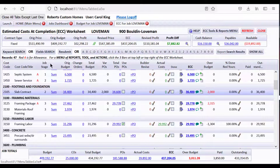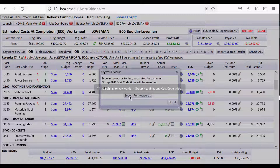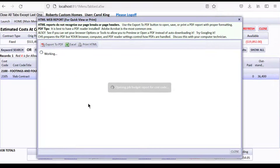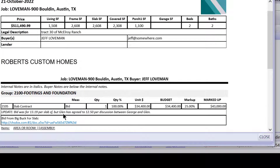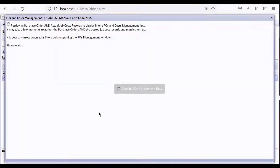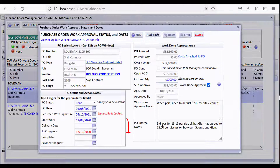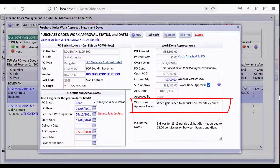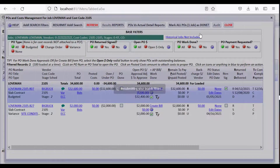Let's look at the budget with a keyword search — I'll focus in on 'slab contract' by typing in 'slab.' Drilling down on this original budget, it says the bid was for $13.19 per slab square foot, but Glenn has agreed to $12.50 per discussion. If you drill down on the POs issued — including variance POs — and look at the work notes, you can see why a PO was issued for $32,600 instead of the original bid. Also notice that the field person typed 'when paid we need to deduct $200 for site cleanup' — that's going to be important when we enter our bill.